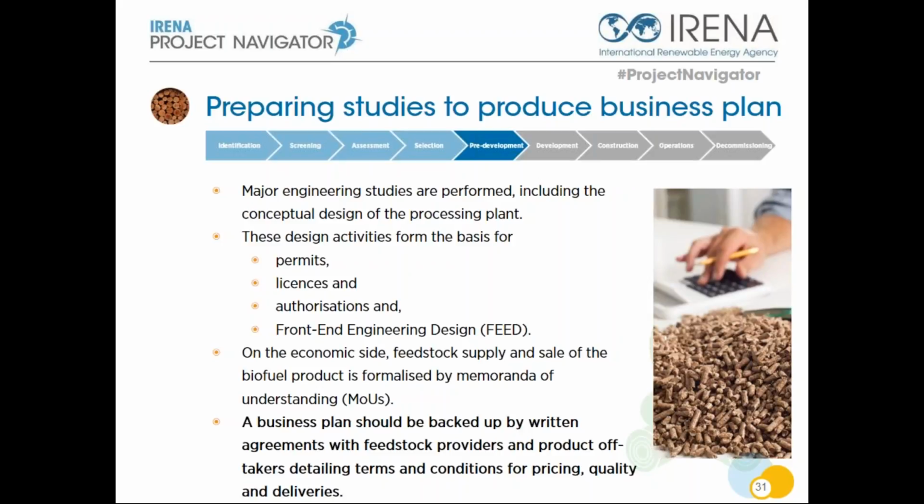Investors and banks will generally consider financing a bioenergy project only if a feedstock supply agreement and an off-take agreement are in place. A lender might also limit the term of the loan to the period of these agreements. Where no agreement can be obtained, developers should produce an independent third-party feedstock assessment that shows that sufficient feedstock is available over the long term. Off-takers such as utilities with large enough balance sheets to support the agreement usually require annual volumes in excess of what small to medium-sized projects can deliver. Therefore, selling to a well-established market or the submission of a solid market assessment will reduce the investment risks.